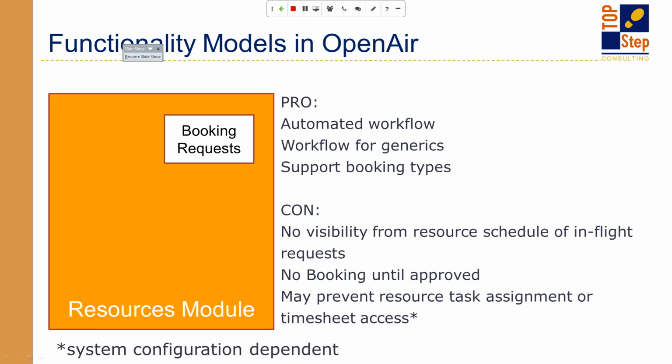A generic resource is sort of a placeholder user. It's not associated with a real human being, but it can be associated with things like job code, a role, etc., so that you can perform forecasting against your resource needs, without having to actually book a real live person to a project.